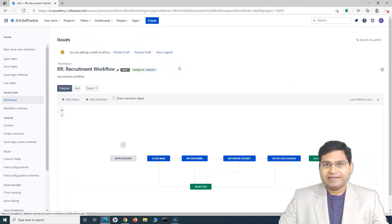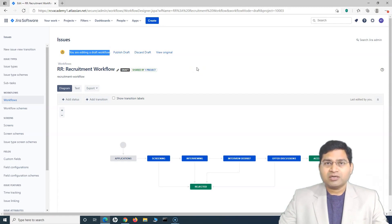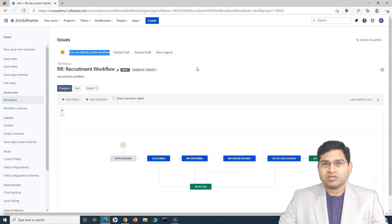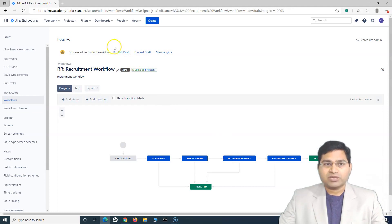As soon as you click on edit workflow, you will get a message: 'You are editing the draft workflow.' What happens is when you click edit, Jira work management automatically creates a draft version of the workflow — this is true for any Jira project, whether Jira software or Jira work management. It creates a draft and whenever you are changing something, you are changing it on the draft. Once you are happy with the draft, you can publish it back to the live workflow.